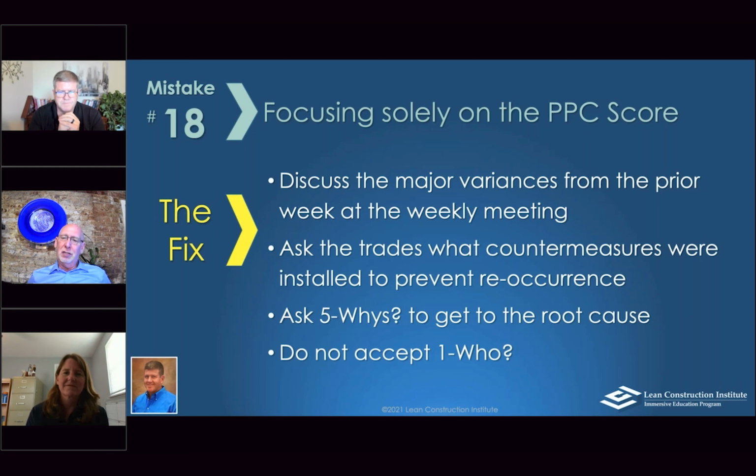Yes. When things are tied together, we do this sometimes in MEP. Sometimes we'll take the entire MEP package out, or portions thereof, or the sprinkler package out, or portions thereof, and do these separately because they're so complex within themselves. But we'll keep a separate set of swim lanes for them. They'll fall into line in the sequence, in between the proper milestones. But again, there'll be many lanes down, and they're a special group. But what I was going to say was everything's different.